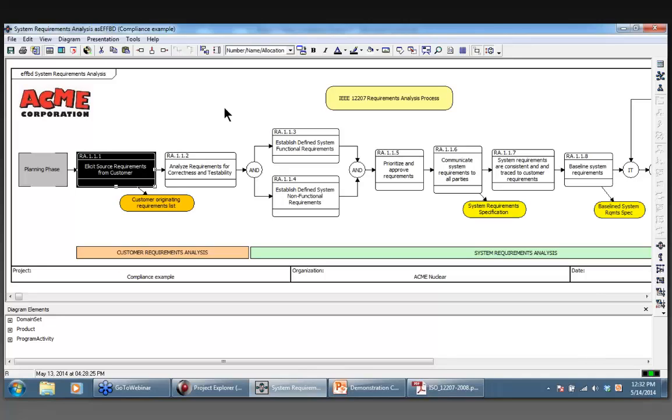What that means is that these tools do not prescriptively restrict the order or the stages that you go through. And this is a good thing. Some workflow products will not let you move to the next step until there's been some validation that this has been complete. Well, the issue with that is that if you're part way complete with this step, it would be nice if you have resources available to move on in those particular areas and do the next step even while others are completing the previous step.